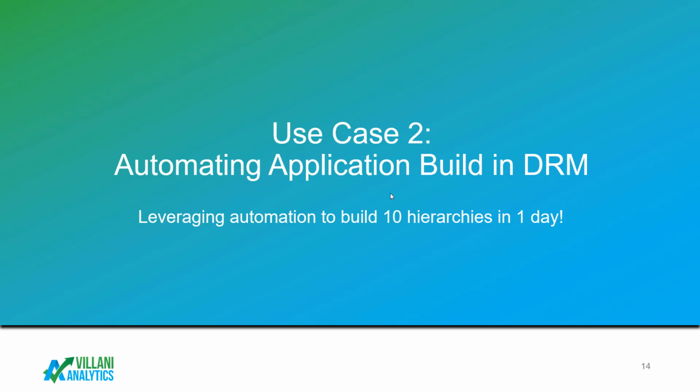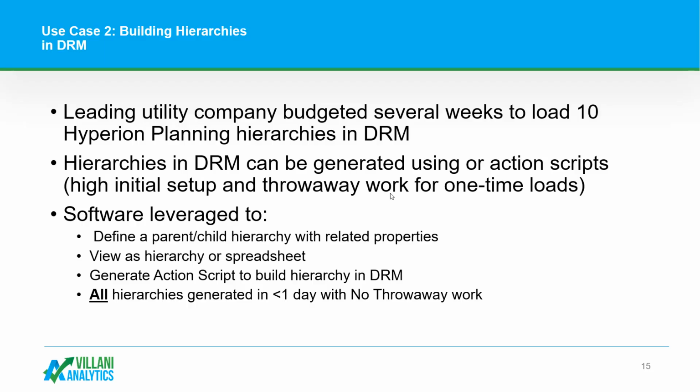Use case 2, also with DRM: a lot of times when you're in the build process of the project, it can be challenging and cumbersome to load dimensions into DRM. So we had previously built some software that we used, and we were able to bring all the hierarchies for the application in under a day. And for many of you that work with DRM, you may be planning that it'll take a few days to a week to bring in a single hierarchy. We were able to bring all of them in on the first day of the project.